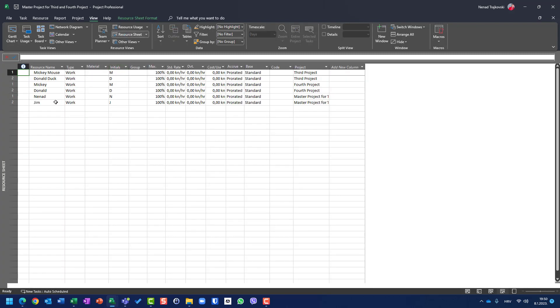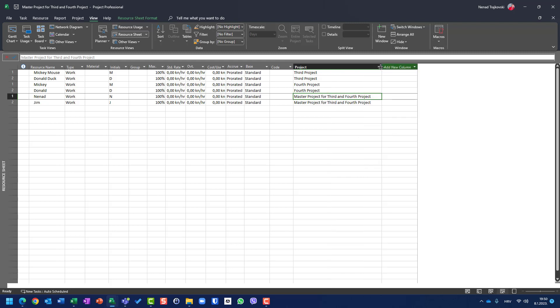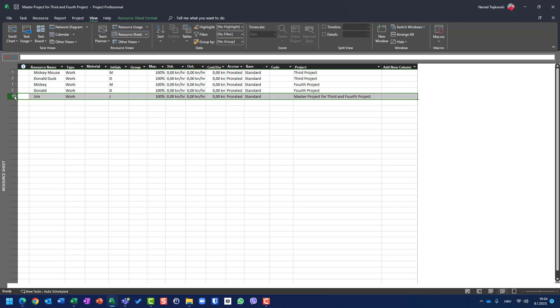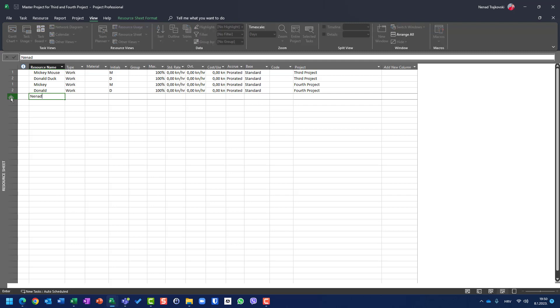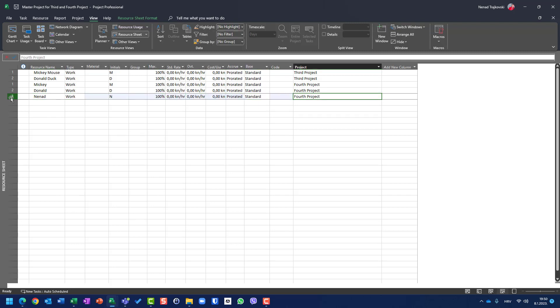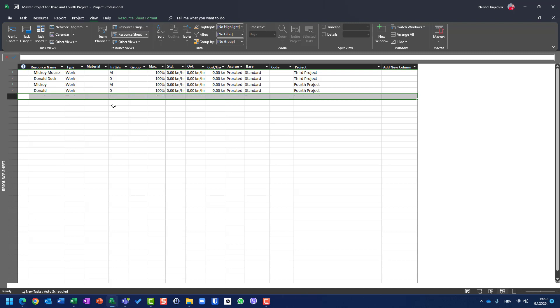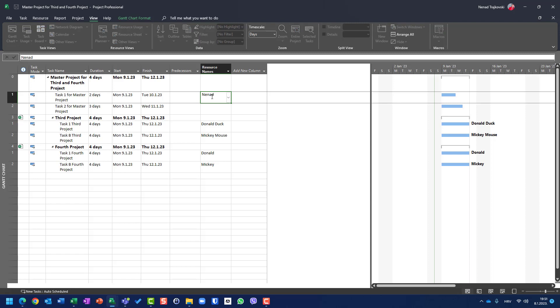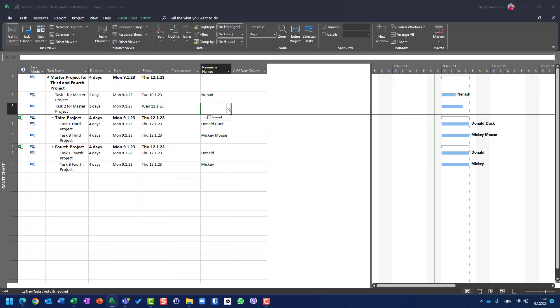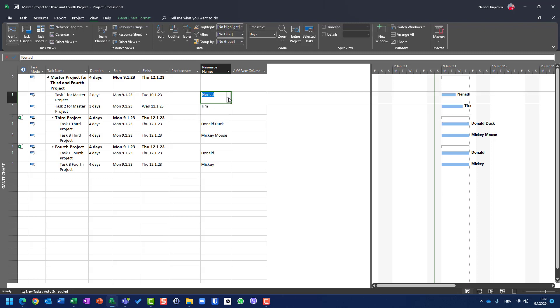So let's go to resource sheet. You will see Nenad and Jim master project for third and fourth project. So basically, I will erase them and I will say Nenad, but I am not able to click. When I click here, this is not editable field. So if you want to have specific resource and you want to put the initials, put the maximum units, put the standard rate or overtime rate, put the cost per use, whatever, you cannot create it here.